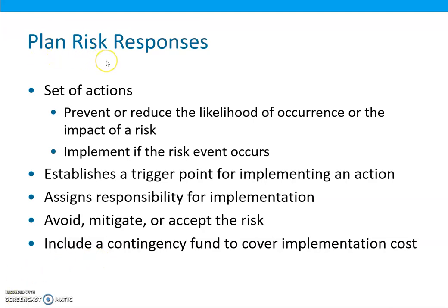Once the plan risk responses have been made, the risks should be monitored. Monitoring risk includes implementing risk response plans, tracking identified risks, identifying and analyzing new risks, and evaluating the risk response process. Risk response plans should be implemented as appropriate when their trigger point is reached. Implementing risk response plans often requires spending additional funds for additional resources, working overtime, paying for expedited shipments, purchasing additional materials, and so forth. So project prices and budgets should include a contingency reserve to pay for additional costs associated with implementing response plans.